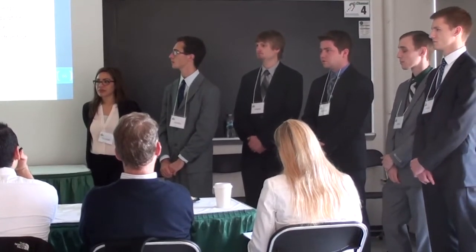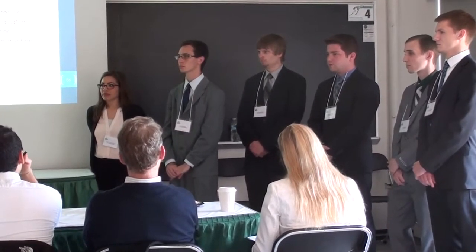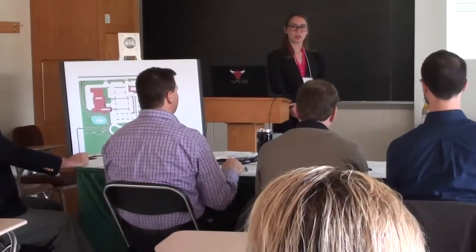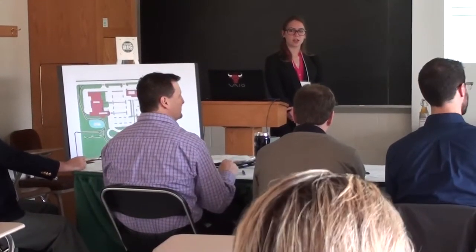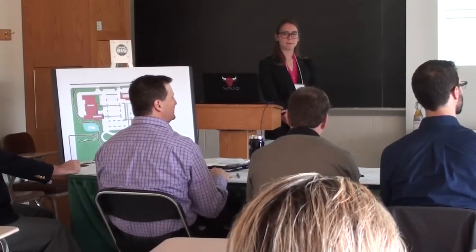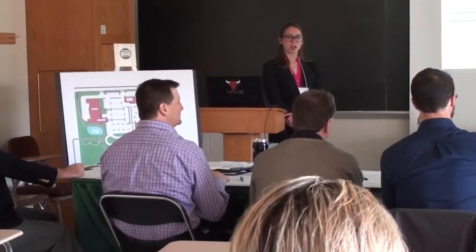Okay. Well, it's always good to have kind of a top end number, but earlier in the phase, especially working with developers, you can scare them away if you get too high. So if you pile too much conservatism on them, you could kill the job by being too conservative. So you've got to kind of practice with me to recommend that.